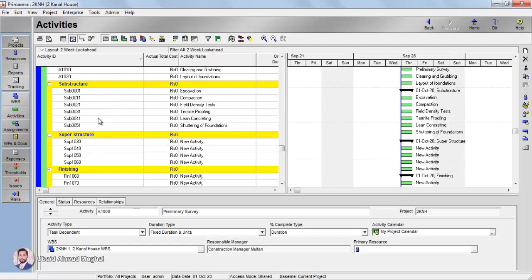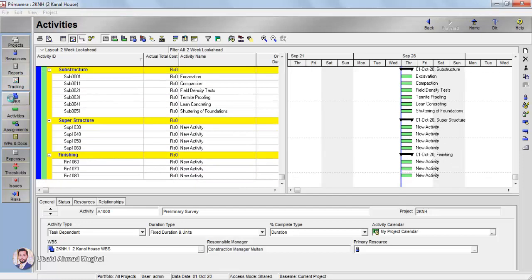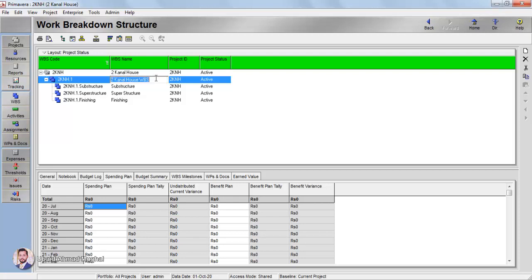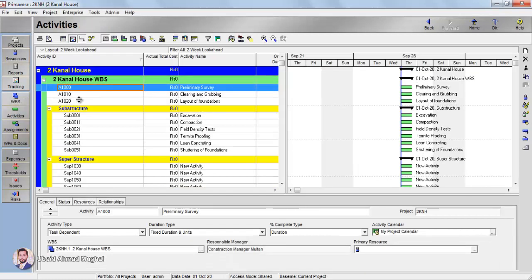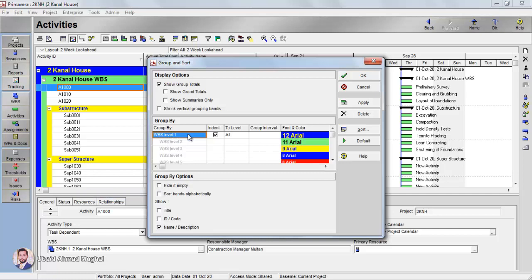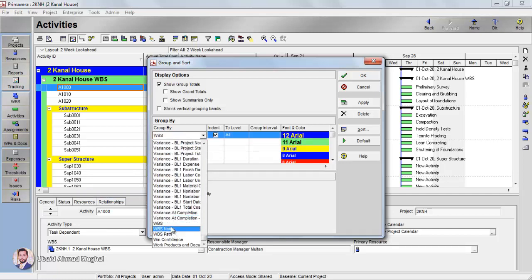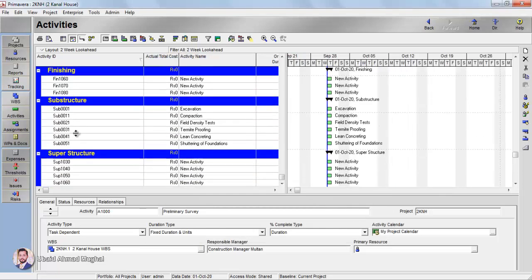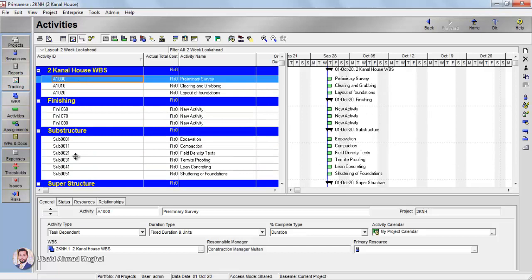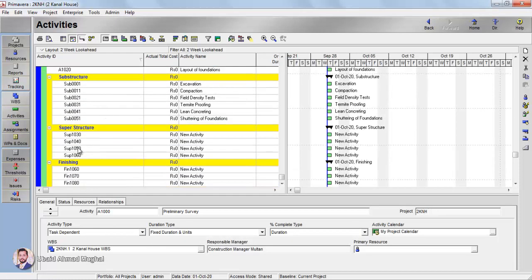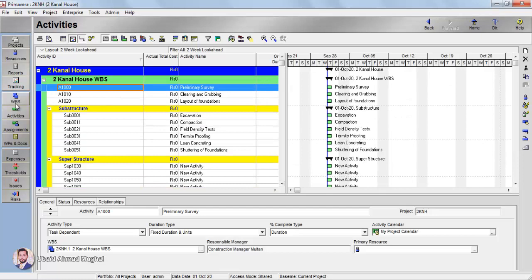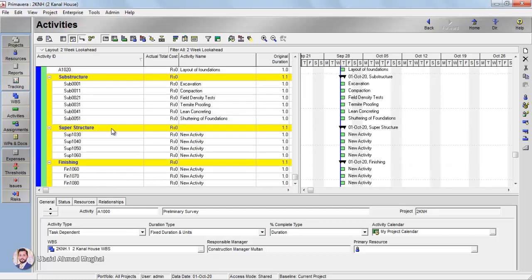In this tutorial we added activities and learned how to make a Work Breakdown Structure. In the WBS view you can also give names to the WBS elements. If the names don't appear in the activities view, right-click and go to Group and Sort, then select WBS and WBS Name — click OK and you'll see Superstructure, Substructure, and Finishing as group headings. You can revert to the default view by going back to Group and Sort and changing the setting.